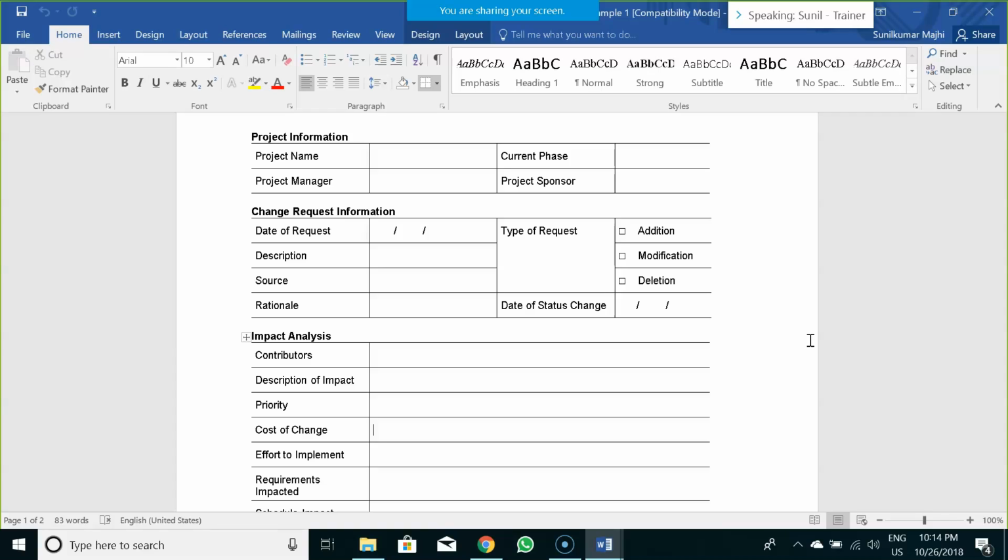Now that work order has to go through a management approval process. So there could be your project manager or whoever is involved. He would be approving those work orders. So change request is not handled the same way. Change request is essentially a requirement which comes from the business user side. So always the business user would raise a requirement.